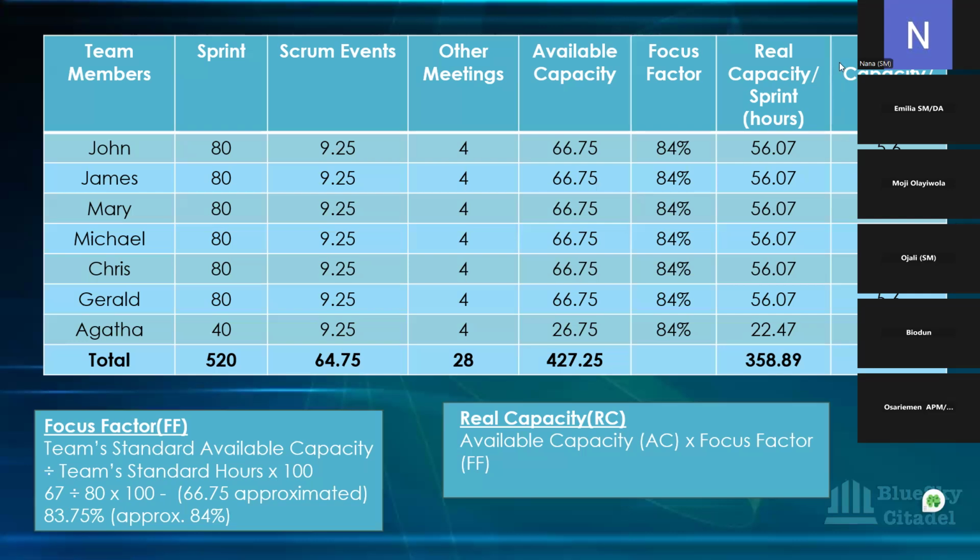Okay, so that's what the real capacity would look like for the sprint and per day if there was no bank holiday and nobody took time off. You can see that you have more hours to work than if there have been holidays. And this is why you plan your capacity: to know the available hours that your team members, either individually for a day or for the whole sprint, have in order to do the work that they need to do.